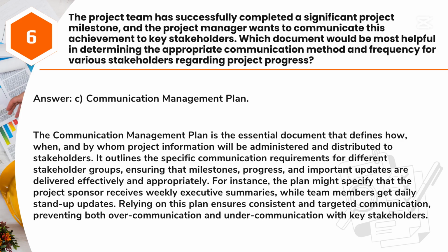Answer: C. Communication Management Plan. The Communication Management Plan is the essential document that defines how, when, and by whom project information will be administered and distributed to stakeholders. It outlines the specific communication requirements for different stakeholder groups, ensuring that milestones, progress, and important updates are delivered effectively and appropriately.